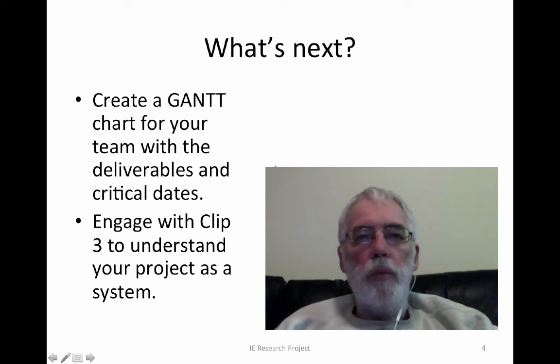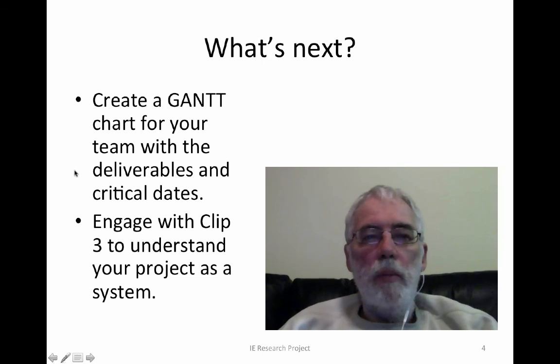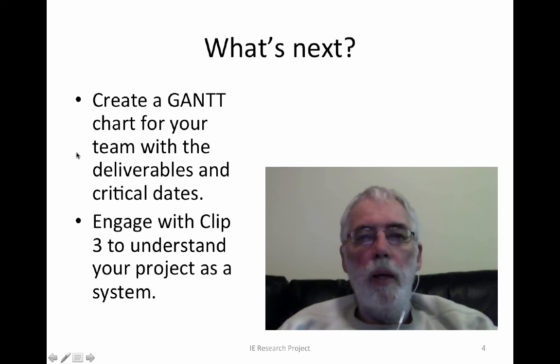So what do you do next with this information? I would suggest that the first thing you do is put into practice some of the skills that you would have learnt in your project management classes with regard to managing your time and activities, your resources. So I suggest that you create a Gantt chart for your team and list on it the deliverables and critical dates and any other items that you believe will help you schedule your time.